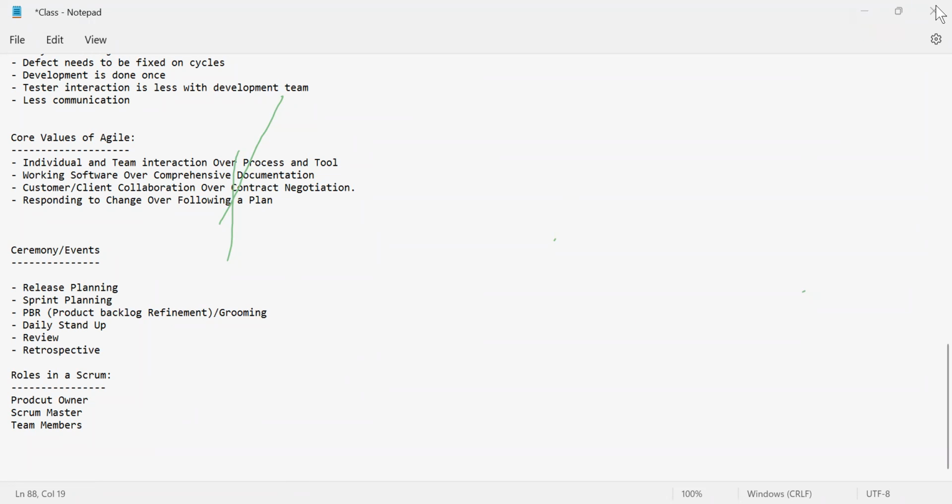Yes, sir. Okay. So, the product owner's responsibility is to break the functionality into smaller chunks, put it as stories in the product backlog, and prioritize it. Based on the capacity, these prioritized stories are pulled into the sprint backlog. There are two backlogs.